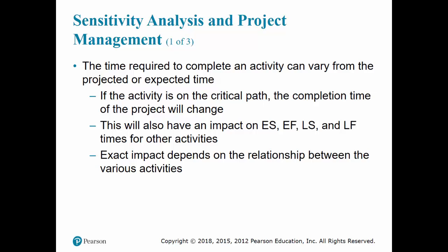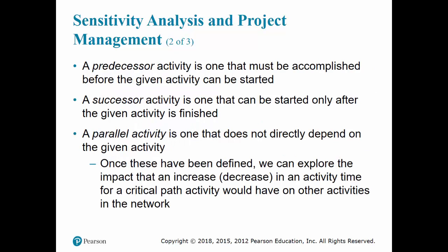So let's look at that sensitivity, and for that we have to look at the activities in a network in three groups. One is our given activity, and what are the activities that come before that given activity? Those are predecessors. Okay, what are the activities that come directly after it on the same path? In one path or another, activities that come after this. And then there are activities that do not have any path in common, so those are parallel activities.